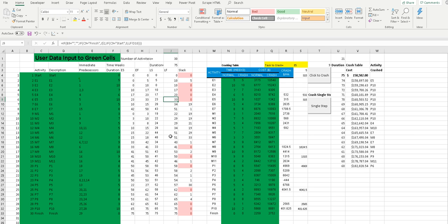Okay. And by the way, the latest start is equal to the latest finish minus the duration. And that's what this is, you see. So that shows you this formula here. So we only really had to go to the early start and latest finish tables, and then these two are calculated from just subtracting or adding the duration.